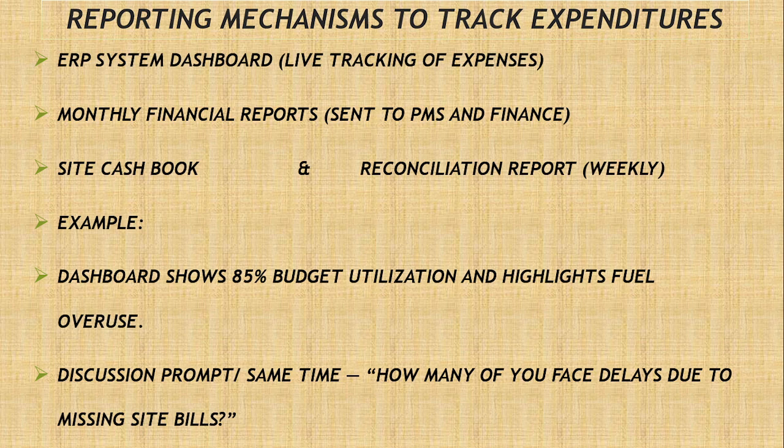Monthly financial reports sent to PMs, that is project managers, in finance. Site cash book and reconciliation report should be prepared weekly. Example: dashboard shows 85% budget utilization and highlights fuel overuse. Discussion: how many of you face delays due to missing site bills?